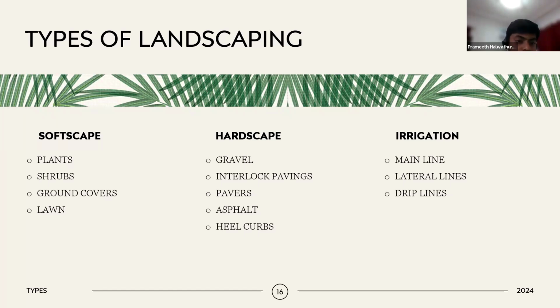So: excavation, backfilling, filling sweet soil, then the planting. Sometimes we are using some geotextiles, soil additives, everything. It's included in softscape.